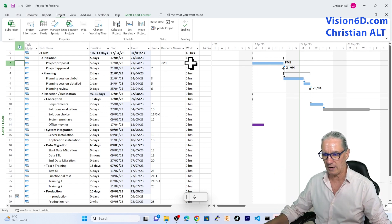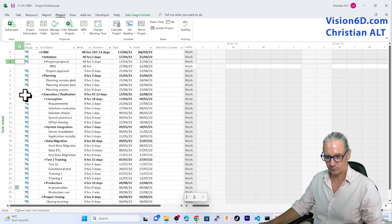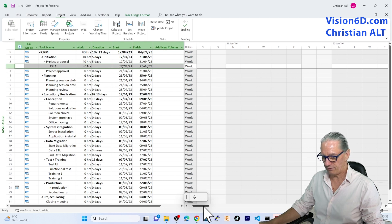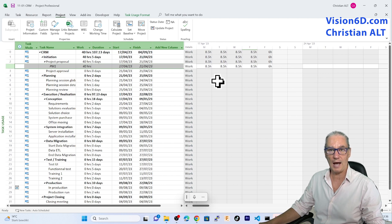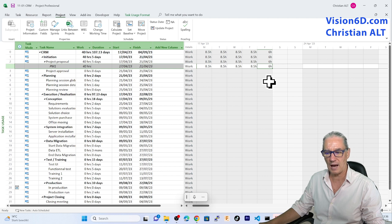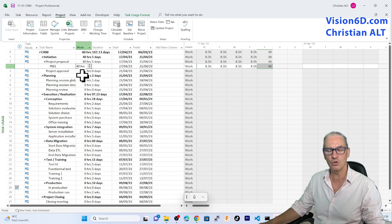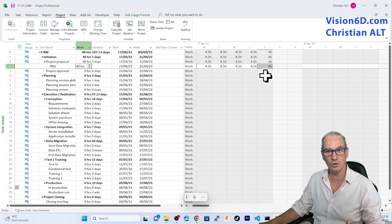We still have 40 hours of work and it's still spanning over 5 days. Going now to the task usage to see what happens — if I select our task, we see that the working hours per day have changed to 8.5 per day. The exception is the last day, Friday, which stays down to 6 hours. The reason is that MS Project didn't change the working hours total, kept it to 40 hours. But since we work more each day, there is less to be done on the last day, so the duration is changing.